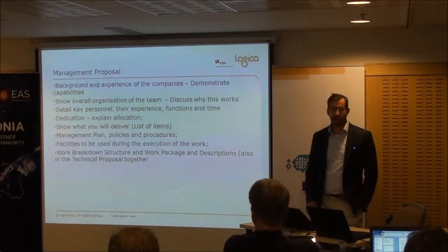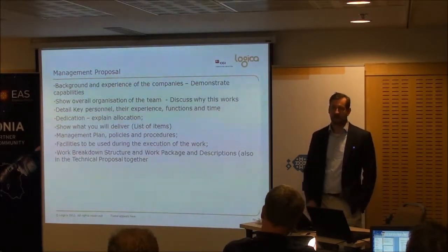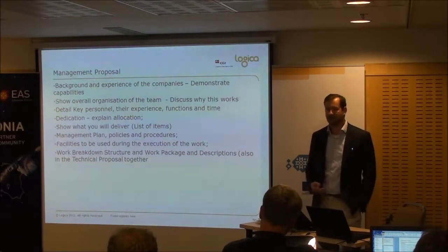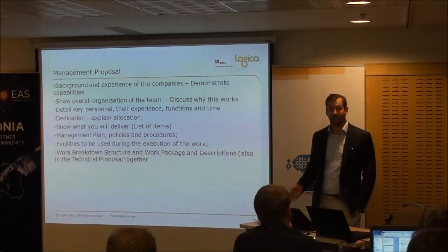You'll need to give an overview of the work package descriptions. This is now, you've broken the work down, you've got the WBS, you'll now need to thrash that out. What I mean by that is you need to go in depth. What are the inputs? What are the outputs? What are the actual tasks that this piece is going to do, and what will it deliver, and how will that flow?